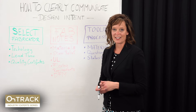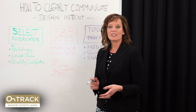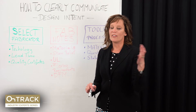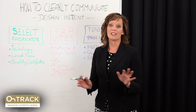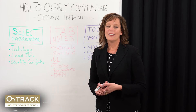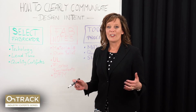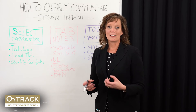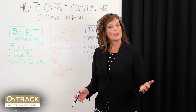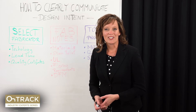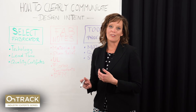After the order is placed, it's very common for questions to be asked at the tooling stage. If you get an email with simple questions, return that quickly. But if the questions are more complex, I recommend asking to have a conference call set up right away. Pulling three or four people together to go through all the issues at once can go a lot faster. Document that conversation just as you would an email trail — it can really save a lot of time versus email traffic going back and forth.